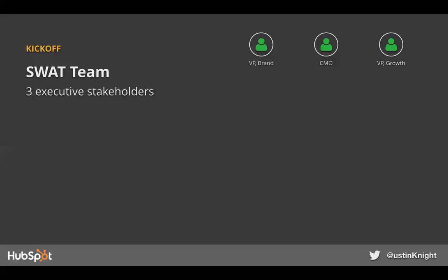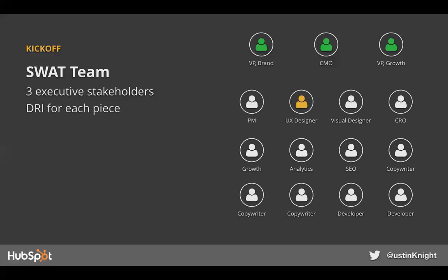So we wanted to limit the approvals process and just have key partners from each critical part of the organization that we could run everything through. So we had one person that was 100% of brand input, 100% of marketing, and 100% of growth. We then assigned a DRI for each part of the project. So you'll see there was one UX designer, that's me, one visual designer, we had 3 copywriters, a couple developers, but this was a pretty small team. It was 12 individual contributors that would be tasked with doing this entire project, and there was a reason for that. We didn't want to have stakeholder bloat.